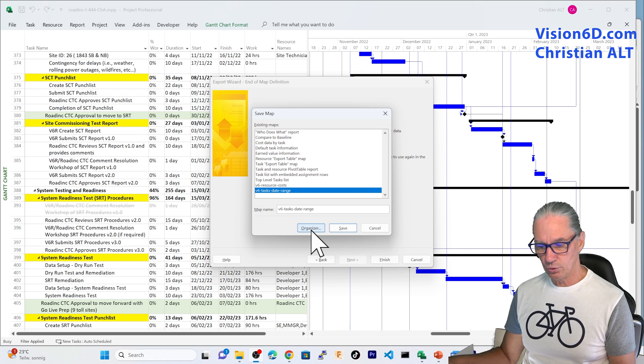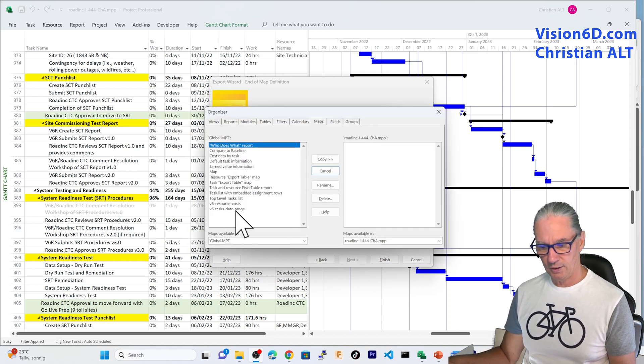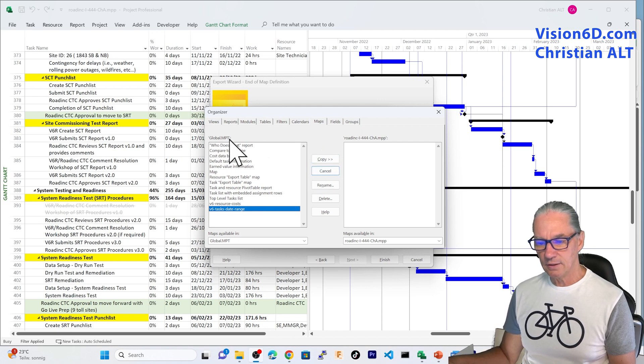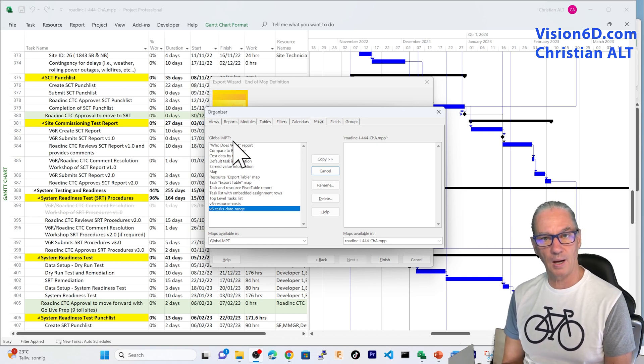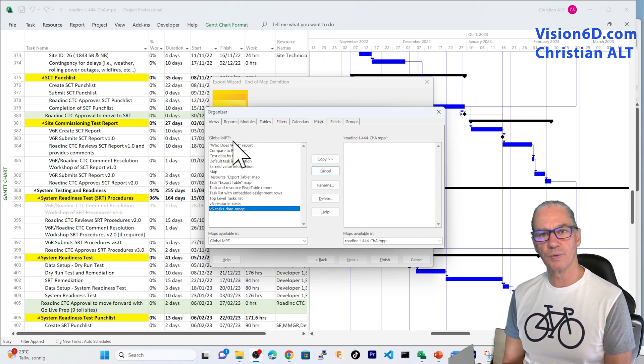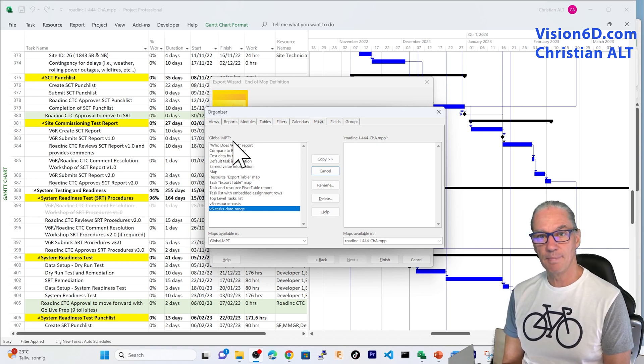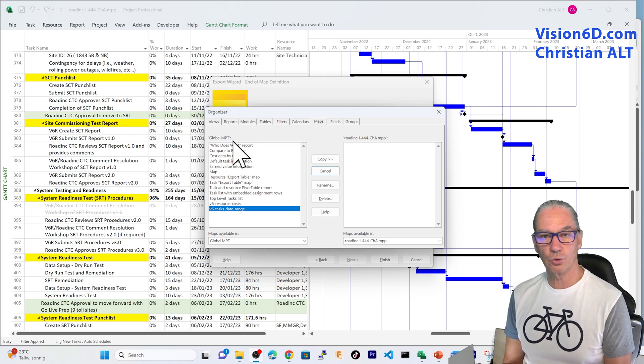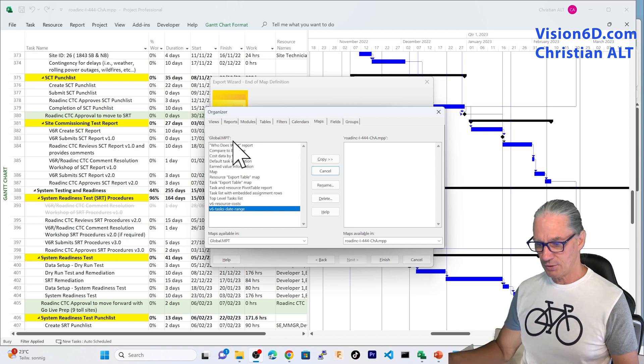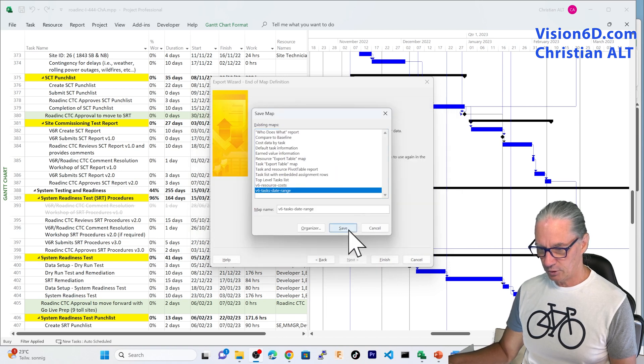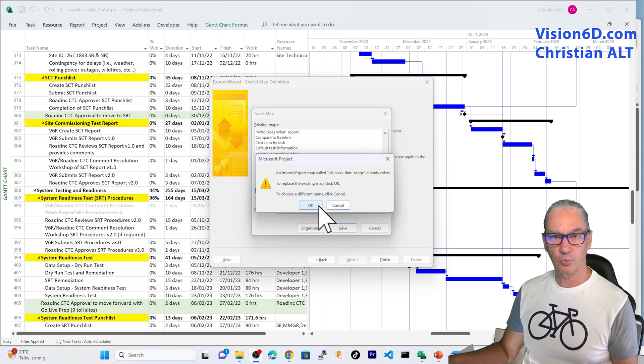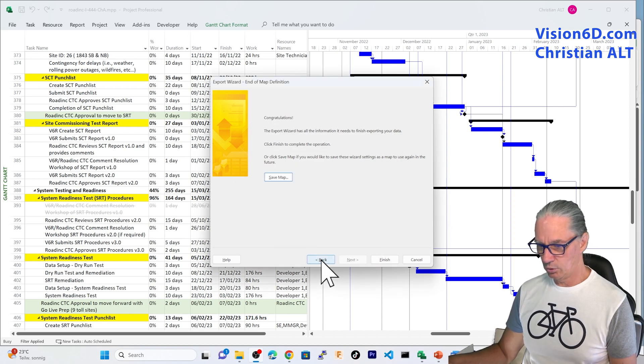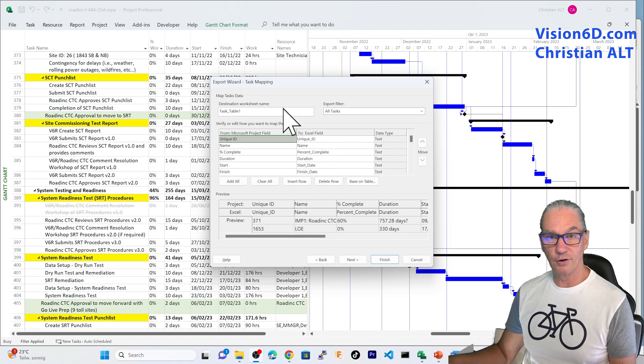What I could do here is also use the organizer. And you see that I could save in the file that is GlobalMPT, the map I have. In that way, I'm able to reuse the map, not only in this project for further uses, but in other projects. So, once you create a map, it could be interesting to keep it for other projects. So, I'm going just to cancel this, to leave it as it is. And I'm going here to say save. OK. It tells me that it has already a map with that same name. So, I'm saying OK.